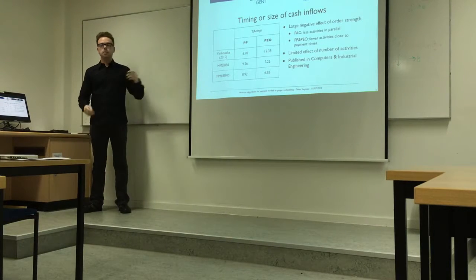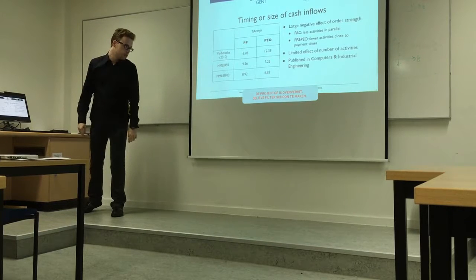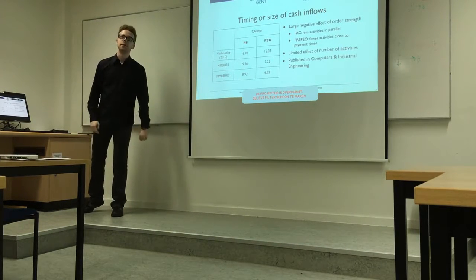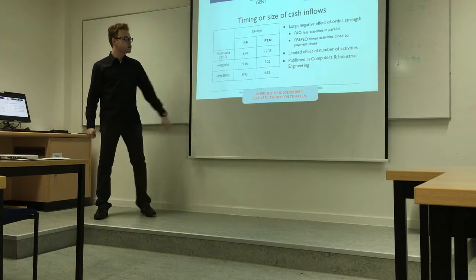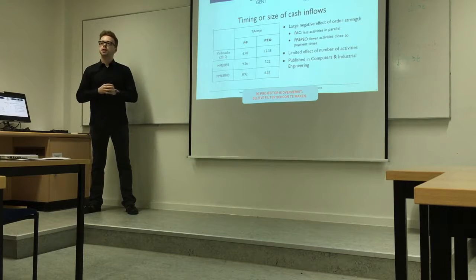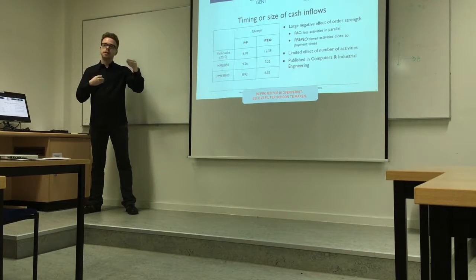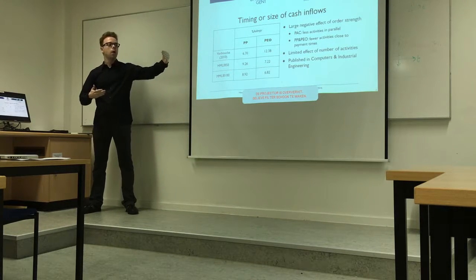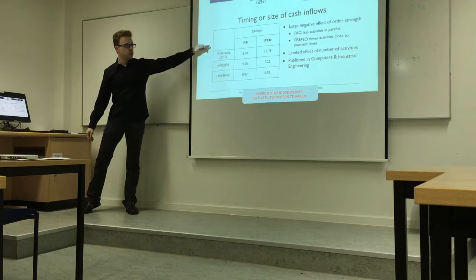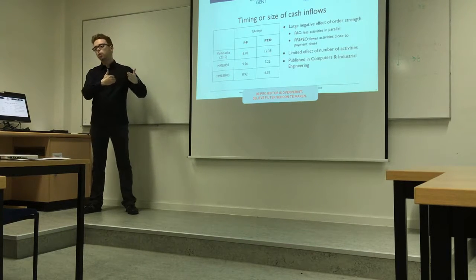This negative effect of order strength occurs because higher order strength means fewer activities can be scheduled in parallel. Instead of scheduling each activity around its own preferred finish time, you schedule them more serially, so some cash inflows are received later and cash outflows you'd prefer to delay must be paid earlier. In this chapter's payment models, the analogous effect is whether an activity is scheduled closer to or further away from a payment time.